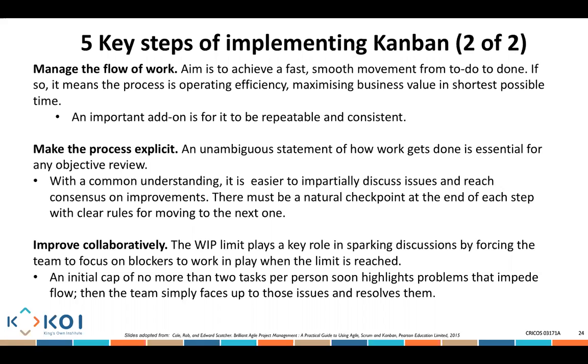Work in progress plays, if you want, a key role in sparking discussions by forcing the team to focus on blockers, anything that is blocking progress, especially in the work in progress. We're going to say, okay, let's stop for a second. Let's collaboratively solve that problem. Let's collaboratively find something that is actually inhibiting my progress and take the actions that are required to be able to solve that.